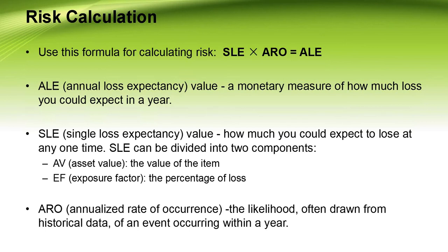Okay, so third is ARO. ARO is the annual rate of occurrence, the estimated possibility of a specific threat taking place in a 1 year time frame. The possible range of frequency values is from 0.0 to some number whose magnitude depends on the type and population of threat sources. When the possibility that a DOS attack will occur is 50%, the ARO is 0.5. After you calculate the SLE, you can calculate the ALE. This gives you the probability of an event happening over a single year.